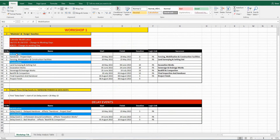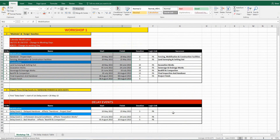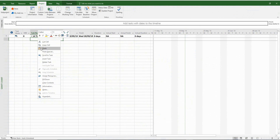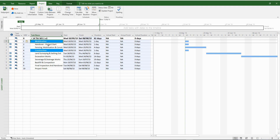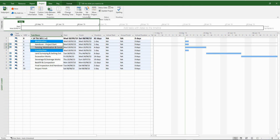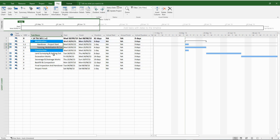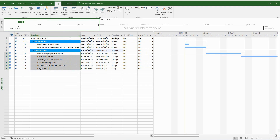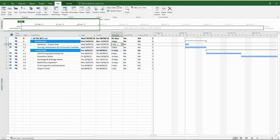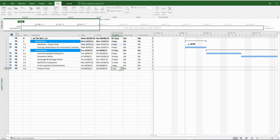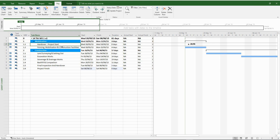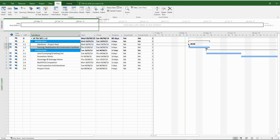Now it's time to transfer all the activities into MS Project. Now I'm going to indent all the key activities. Let's convert the handover and project finish activities into milestones. And now it's time to link all the activities.